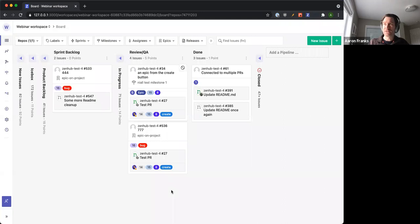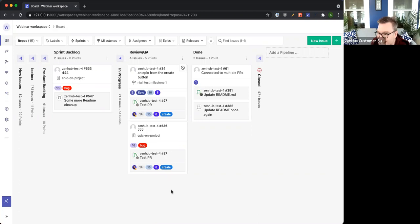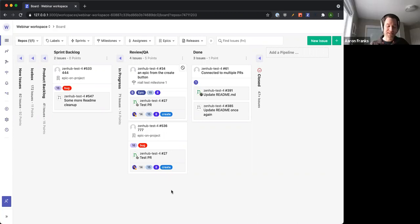So one thing that our team experimented with has been doing some of that work asynchronously. In the true spirit of MVPs, what my team actually did is I would put together a Google Forms survey with all of the issues that needed to be refined and estimated, and I'd send that out to all the engineers.